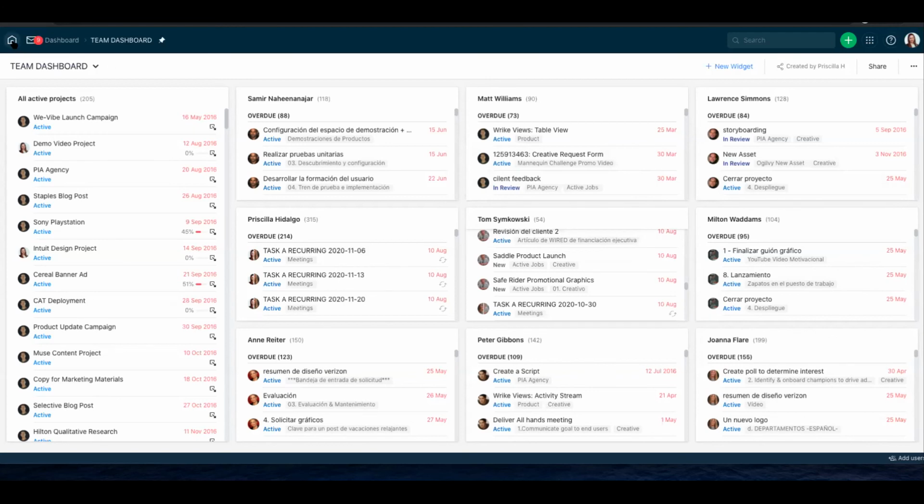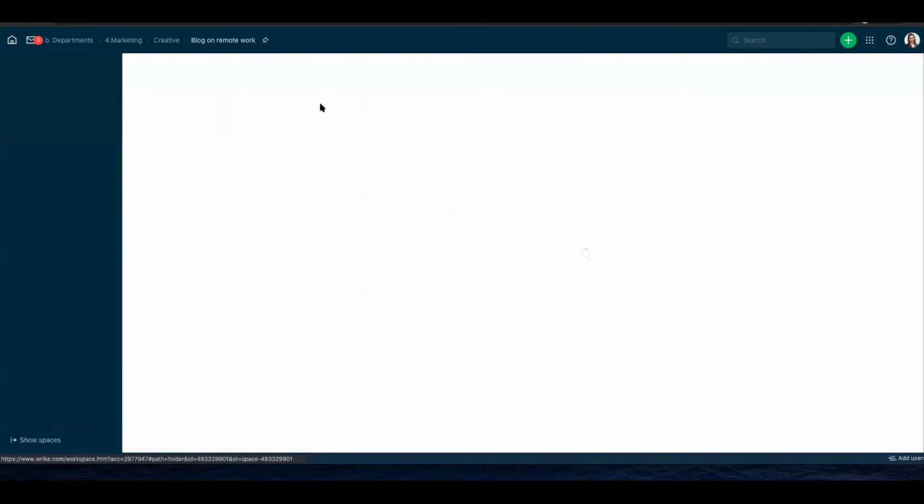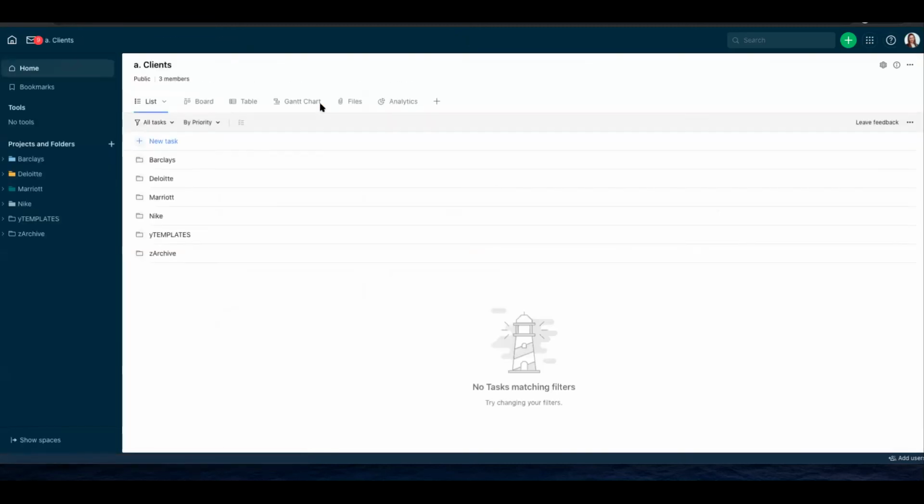So I will go back to my home page. I will select my client space. And now you will see here, I manage a templates folder. So I have already created templates for all my projects related to brand experience and product launch. So every time I need to start a new project for my clients, I just need to use one of these templates and duplicate it.